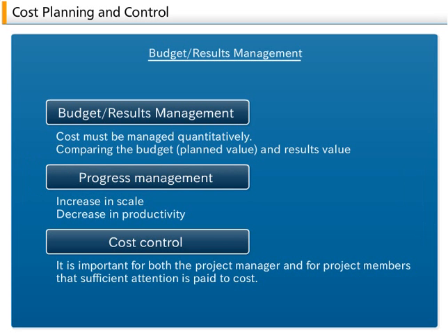There are 2 possible elements which can lead to a variation in planned man-hours and actual work hours. One of these is an increase in scale, added specifications, etc. And the other is a decrease in productivity. The expected standard in the initial estimation stages is not being met.